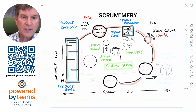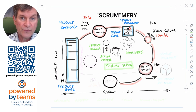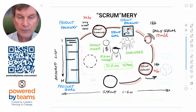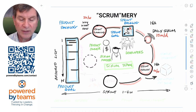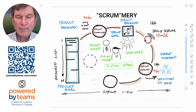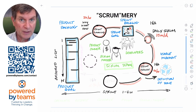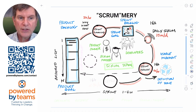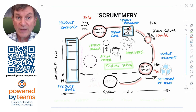For status, there's another inspect-and-adapt event near the end of a sprint known as the sprint review. The time box is up to four hours for a one-month sprint, or about one hour per week of your sprint length. The team, together with stakeholders, inspect and adapt progress towards the product goal by looking at the third artifact — the usable increment produced during the sprint — whose commitment is a definition of done, an intrinsic quality standard: did we build this in such a way that we could actually put it into production? Feedback from the sprint review may adjust the product backlog, which is why you want sprint review before your next sprint planning.